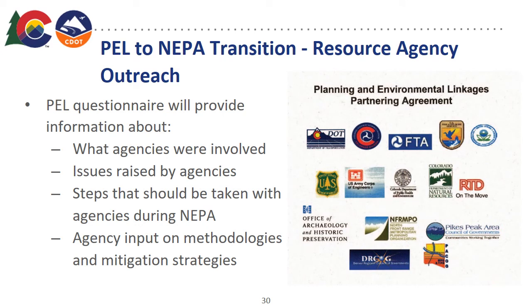And then also, as discussed previously, unlike under NEPA, agency involvement in a PEL study is voluntary. However, it is highly desired. When transitioning, make sure the team understands that the PEL questionnaire will provide the information about what agencies were involved, the issues that were raised by the agencies, steps that should be taken with agencies during NEPA, and agency input on methodologies and mitigation strategies. From our experience, as agencies become more familiar with the PEL process, they do find value in participating.